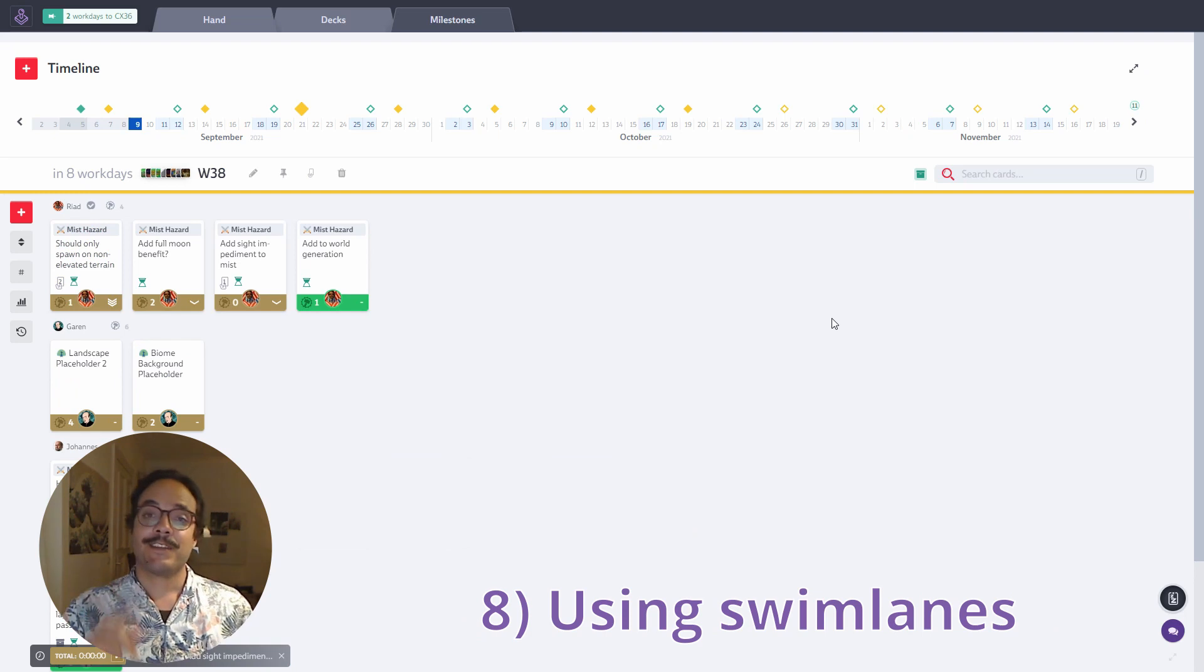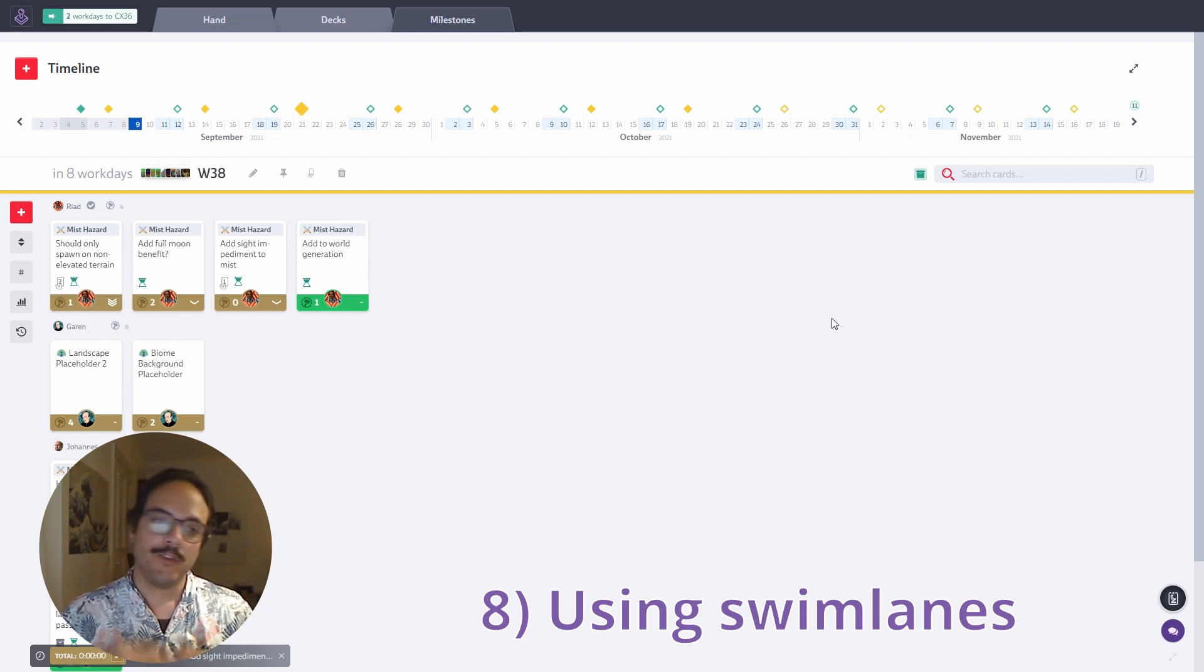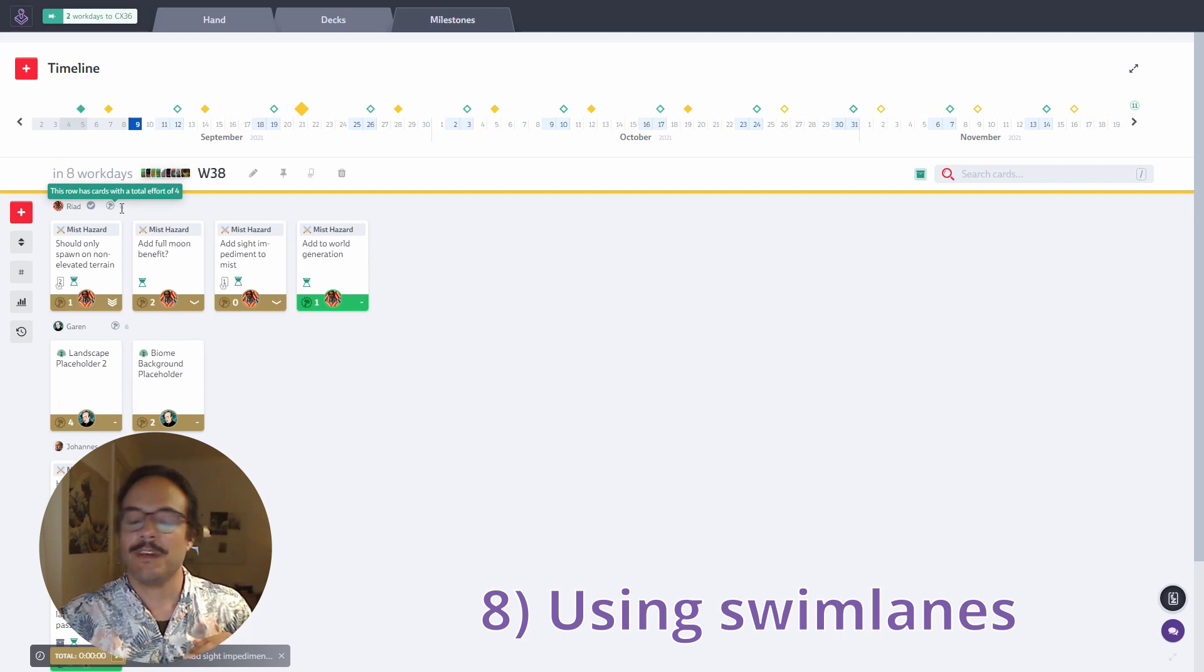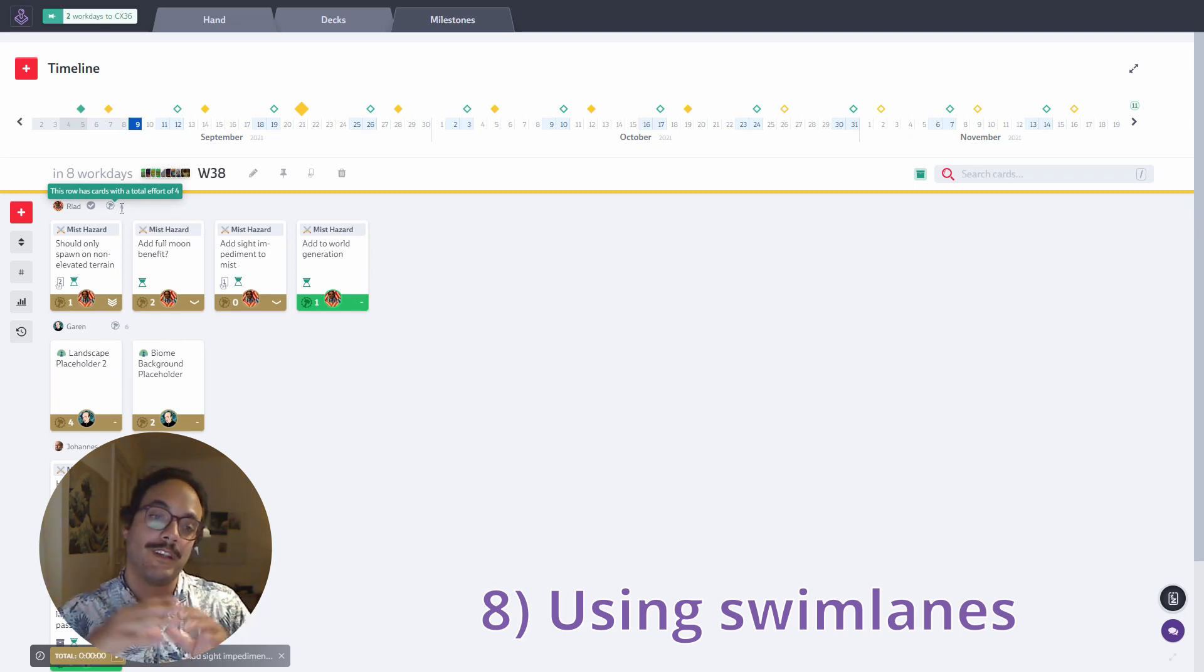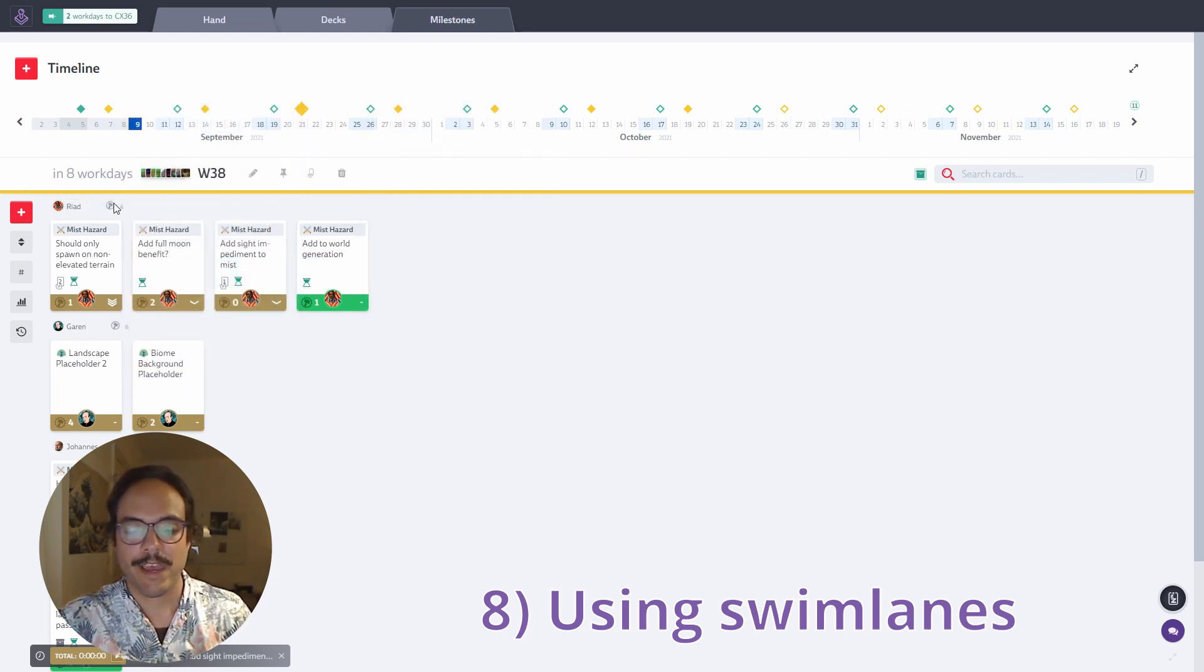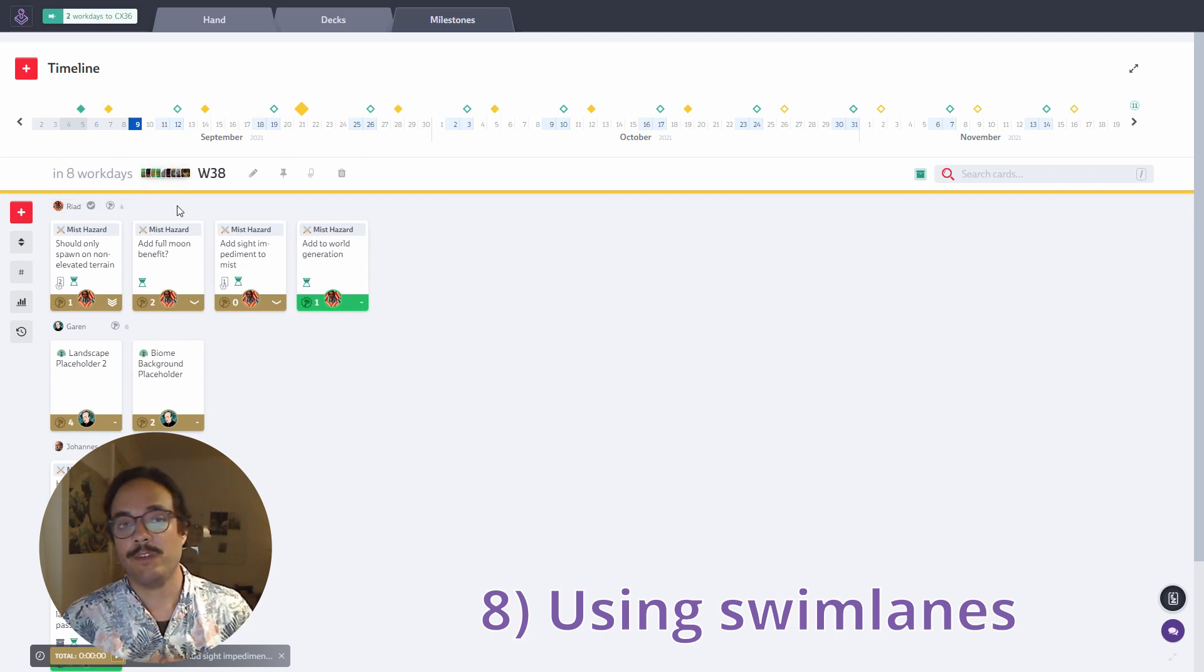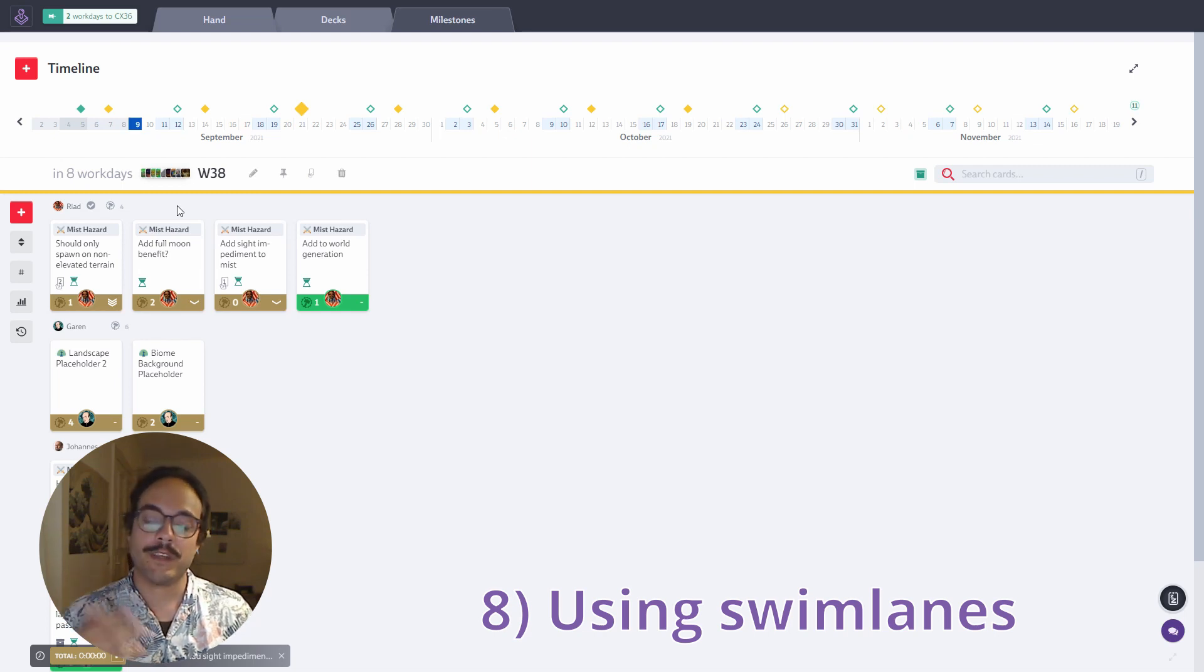Tip 8. So talking about shortcuts, if you sort by a certain criteria, for example, I'm having my cards sorted here by owner, you might have noticed that on the swim lane, as we call these areas, you can see a short overview of the total effort attributed to the swim lane in total. So in here I have 4 cards with an effort of 4 in total. Super useful for us. We use this during planning. For example, in our weekly sprint planning, we plan with 15 points per person. And then we can quickly tell if we go over our limit and over schedule by doing this.